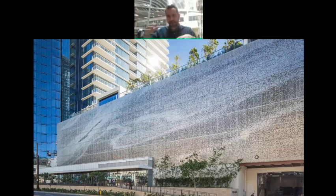Yeah, and I'm not sure if this translates directly to the European format, but we have design-bid-build projects, which would be the more traditional. A project is designed completely, there are construction drawings, it's bid out to different contractors, and then it's built. Design-build is where we prefer to operate. We get involved in the design phase, really as a consultant. If a designer comes to us with a design, we'll get involved under what we call a design assist contract, often contracted directly to an architect.